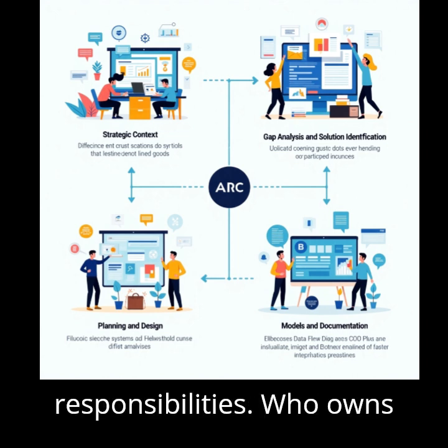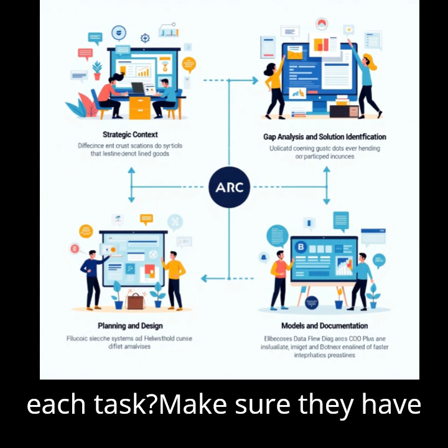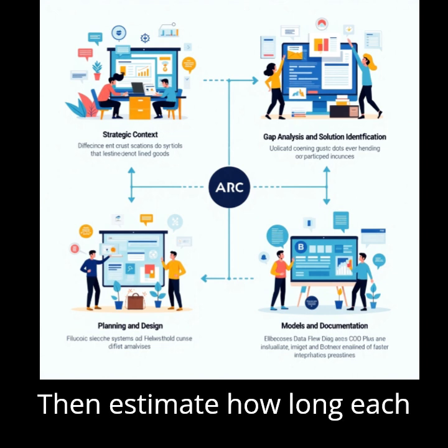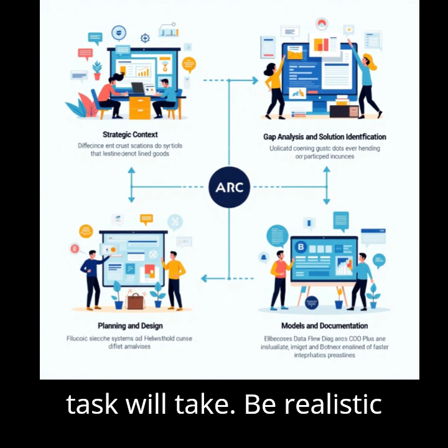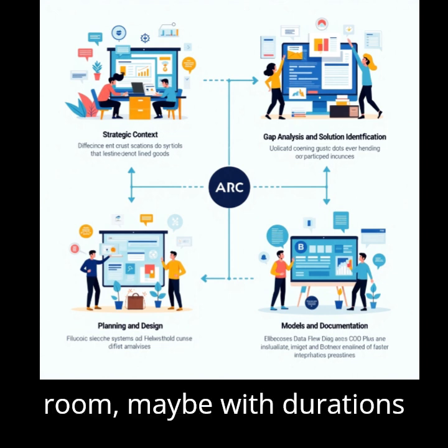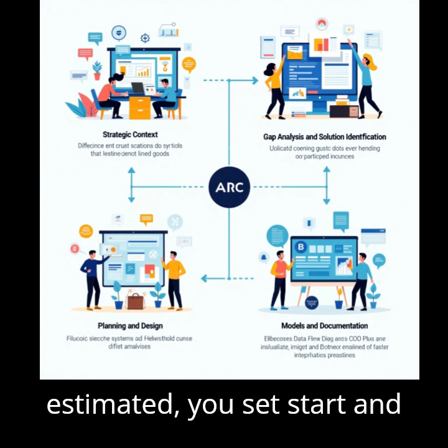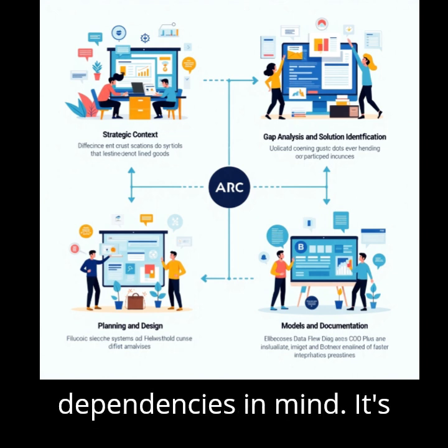Next, assign responsibilities. Who owns each task? Make sure they have the skills and resources. Then estimate how long each task will take. Be realistic here, build in some wiggle room, maybe. With durations estimated, you set start and end dates, keeping those dependencies in mind.